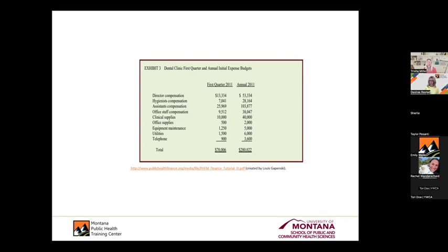Now, here's an important note about this particular budget. This one is divided by 4 quarters. And remember what I said the other day, that could get you into that quarterly budget trap, right? If your program spends more money in a different part of the year, if you just break that budget down by quarter and divide by 4, you're going to see some serious variance, right? One quarter you're going to look like you're way under budget, and the next quarter you're going to look like you're way over budget, right?